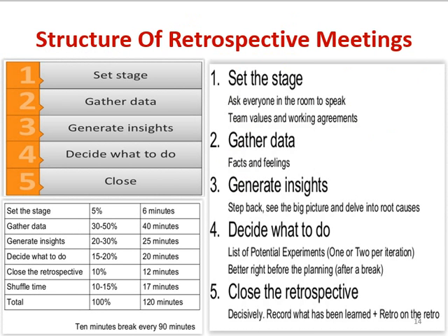Next, in the slide, I have for you the structure of a retrospective meeting. I was using the term retrospective meeting throughout my session in earlier modules also. So what exactly is the retrospective? In a retrospective meeting, we do a deep analysis of what went fine, what went wrong, what were best practices, the kind of learnings in any iteration. So after every iteration, we do a retrospect.